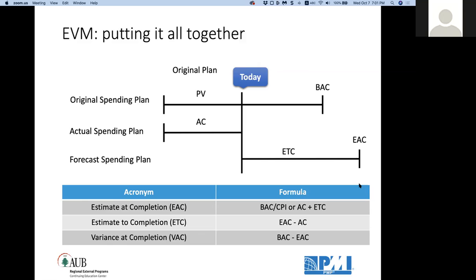EAC وETC انت عم بتقول لي اياهم انا ضعت. بس جابي الاستيميتد ات كومبليشن هن كمان الاجريجيشن تبع الاستيميت تو كومبليشن، يعني اتس ان استيميشن كمان. هي part of it actual اللي هو الاكتشوال كوست بلس ان estimate to complete. ايه بلس ان استيميت. اوكي خلاص.